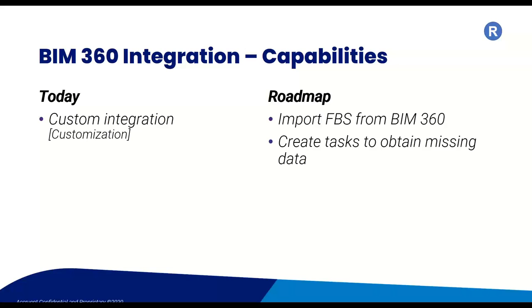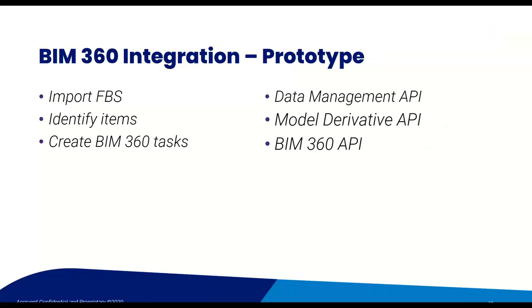And also creating tasks to obtain missing data, so we can import the data from BIM 360, then check it against the checklists. And if things are missing, then we also want to create tasks in the BIM 360 project, so that the project immediately knows that certain data is missing and needs to be delivered. So much more proactive in signaling data deficiencies.